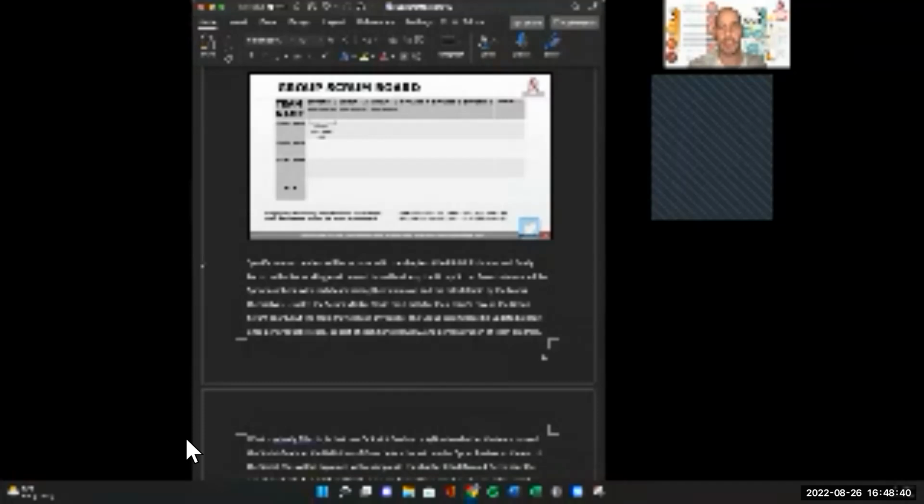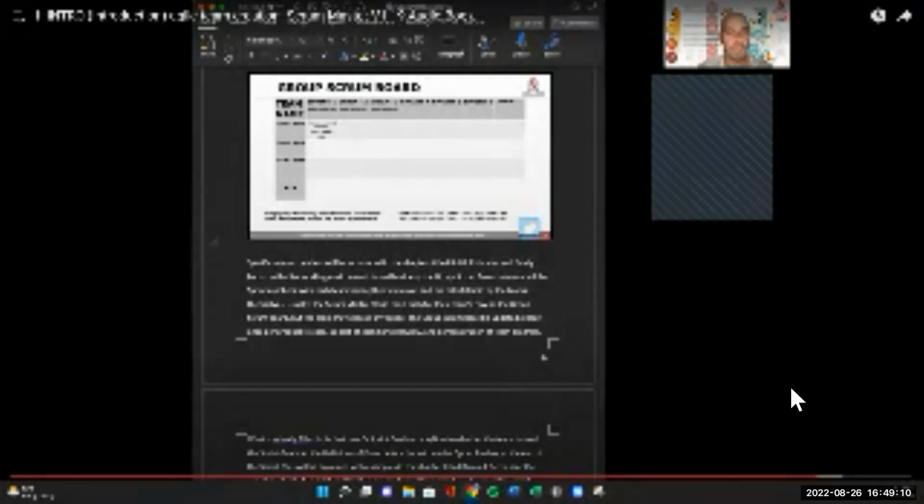The specific column headers will be introduced in the chapters titled Build, Estimate, and finally Focus. And in fact, there's a chapter title I want to add since this book was first written. It's called Help Request. It's the first column. And that's where a colorful post-it is put from any team asking for support from another team. Or if you have a leadership team or leadership teams, you're asking for help from them. Things like, we want to hire someone, or the machine's jammed, or none of us know how to do this particular type of algorithm. Does someone in another team know how? And you get this fast response across teams without waiting for another meeting. All of these are shortcuts to avoid wait states, so we have faster pace of innovation.